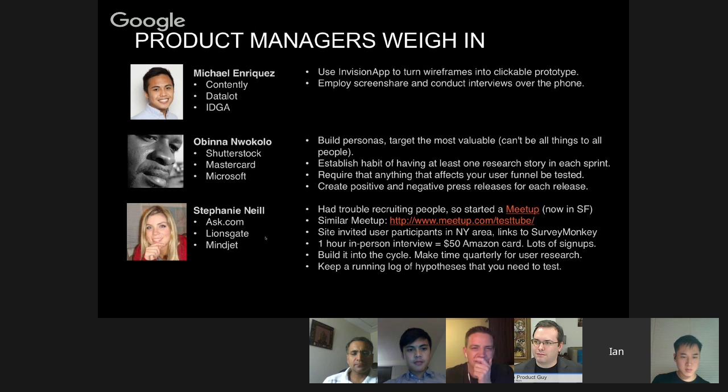My friend Obina, who I worked with, really emphasizes the benefit of personas, and as I mentioned earlier, targeting the most valuable, because you really can't be all things to all people. And he has a great habit, and this is sort of a theme as I talk to individuals: for every sprint, including one story that originates from user research, and being disciplined, having a tangible heuristic that you're putting one in every sprint.